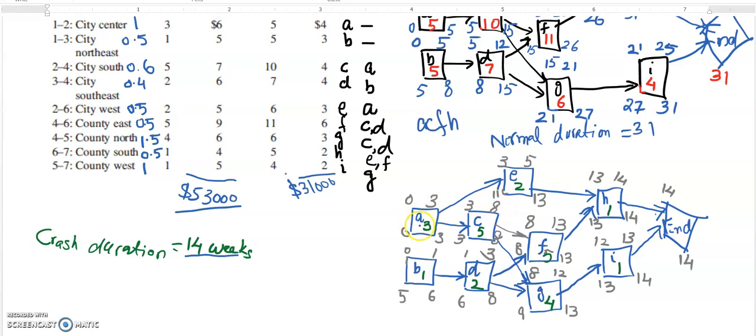network diagram. So we'll look at the activities. A is the critical activity, so we cannot change it. E is a non-critical activity, and activity E has a slack of 8 days. So if I write it over here, E, the slack is 8 days, and activity E is here. Activity E was reduced from 6 to 2 days. So it was reduced from 6 to 2 days. Okay, and that means it was reduced by 4 days.